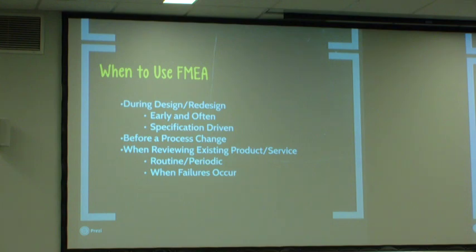As soon as you have specifications, you can do this, okay? So even though you don't know what your design is, you haven't designed anything yet, at least in theory, you can go through and do this. Because you said, I had a specification that I'm designing a thing that should withstand 400 pounds. I can test that or consider the effects of that before I've ever designed the table, okay? So I could think through, how do I need to test whatever it is I'm going to come up with that's going to hold that kind of a load?